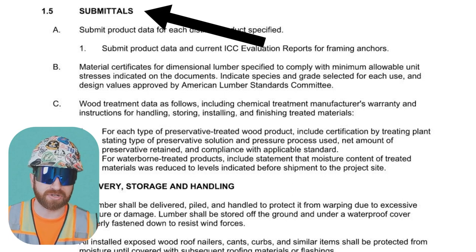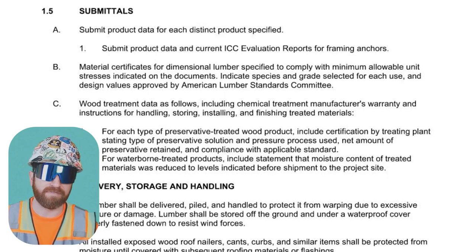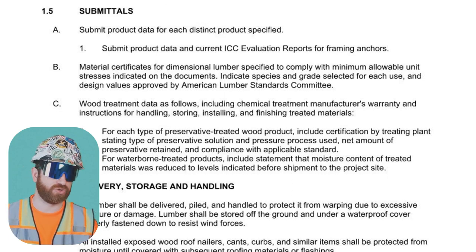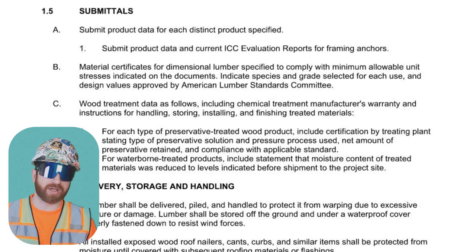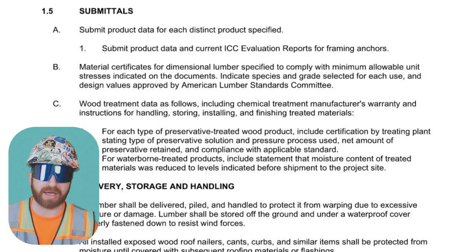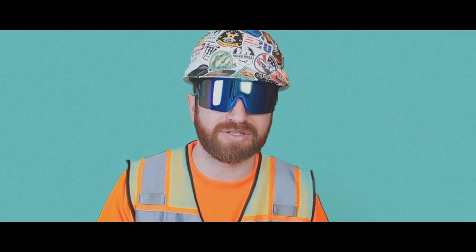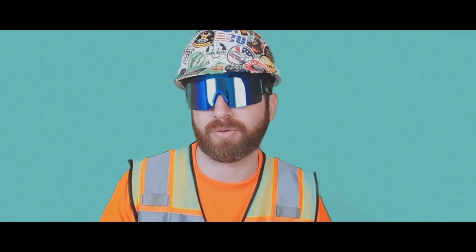These documents are submitted so that the architect and engineer can verify, as sort of a back check, that the contractor is going to meet the intent of the plans and specs. Submittals are not contract documents, and although they provide intent, the installing contractor still needs to follow the plans and specifications to meet their contract requirements.